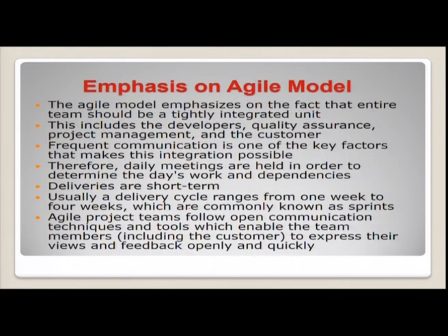Now let us see the emphasis on the agile model. The agile model emphasizes the fact that the entire team should be a tightly integrated unit. This includes the developers, quality assurance, project management and the customer. Frequent communication is one of the key factors that makes the integration possible. Therefore, daily meetings are held in order to determine the day's work and dependencies.